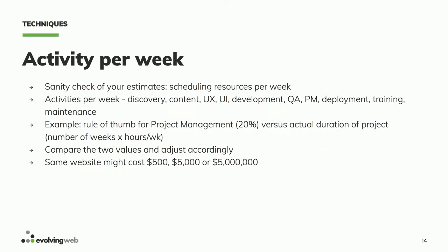And we typically throw in 20% for project management. Sometimes it's less, but usually it's more. It's something we usually run over on, but that's a good compromise.